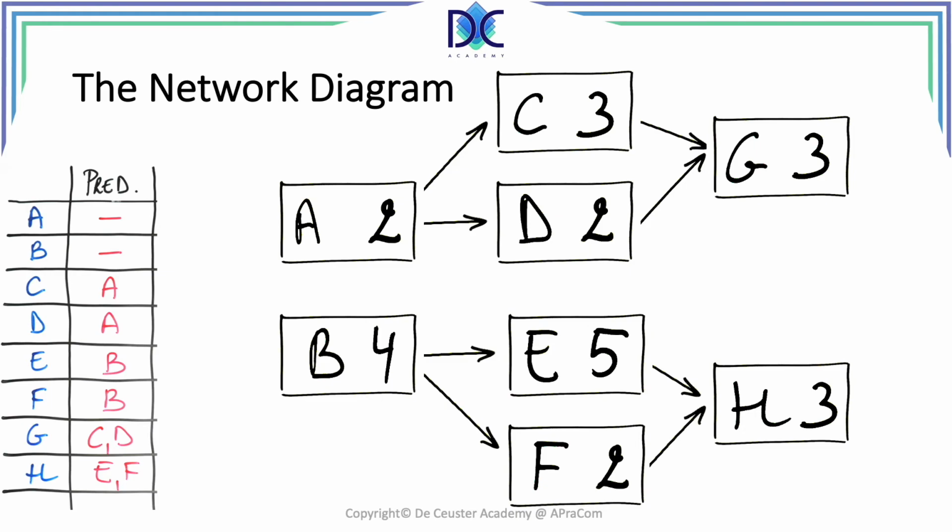Resulting from the good old days of PERT and ADM precedence methods, some people add an activity of duration 0 at the start and at the end of the diagram. However, activities with duration 0 do not exist. They are milestones, and when entering into modern project management software, these are immediately transformed into milestones. In case you are not comfortable with the hanging activities, you can always add a milestone named start at the beginning and a milestone called end at the end of the project.